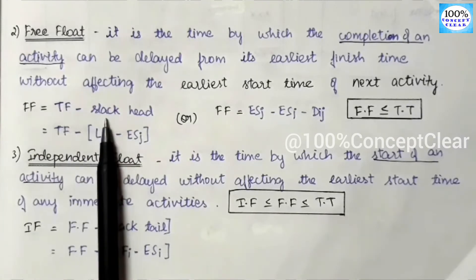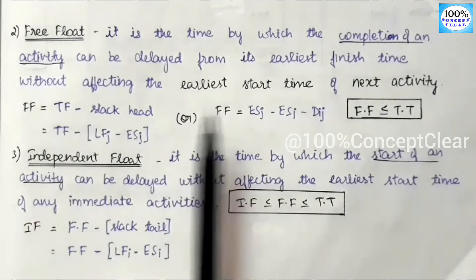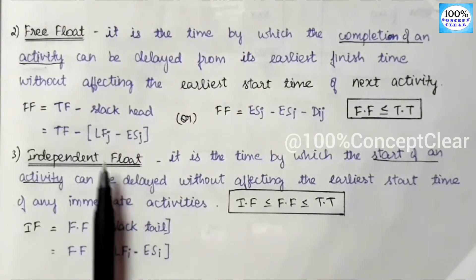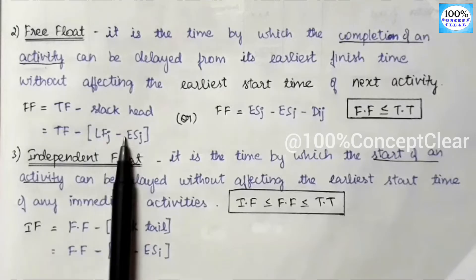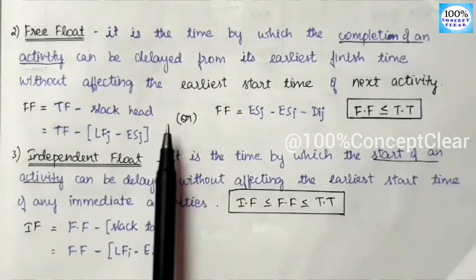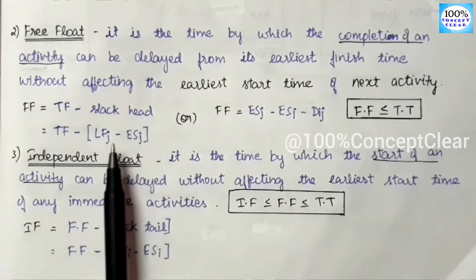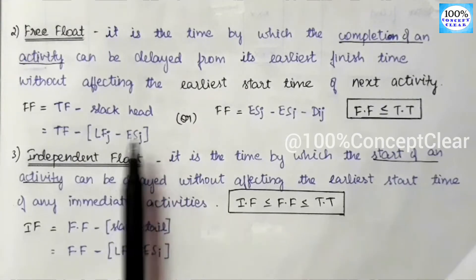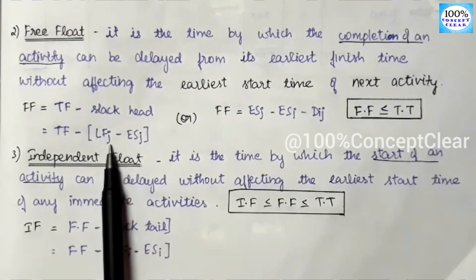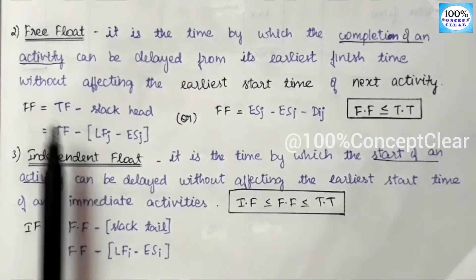The formula for Free Float is: Total Float minus Slack Head. Here, 'head' refers to the ending node, denoted as j. So Slack Head is: Late Finish of ending activity minus Early Start of ending activity. Therefore, Free Float = ES_j - ES_i - D_ij, i.e., Early Start of ending activity minus Early Start of starting activity minus duration of that activity.